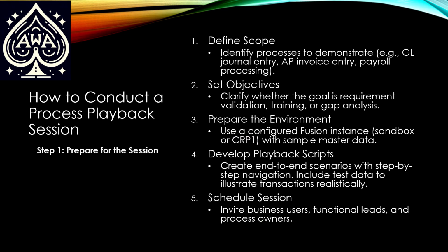Thanks, Lee. All right, that takes us to how to conduct a process playback session. Lee? Thank you, Tom. So this really is broken out into really two sessions, right? So prepare for it. As a consultant, prepare for it. So define scope. What are you going to show? We saw on the previous slide, we had a flow chart with, I think, 9 different areas on there, specific parts. What are you clearly going to demonstrate in the session? Who are you going to have in there, but what are you going to show? What are you going to demonstrate?